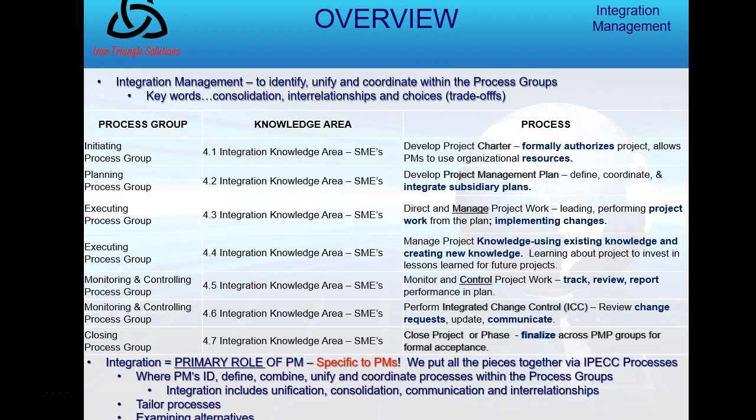Then I have another process in the monitoring and controlling process group in my area called integration management. And that's called integrated change control, or sometimes I'll just refer to it as ICC, where I'm going to use the formal mechanism to review a change request, get it approved or disapproved, log it either way, update the plans, and communicate to the stakeholders.